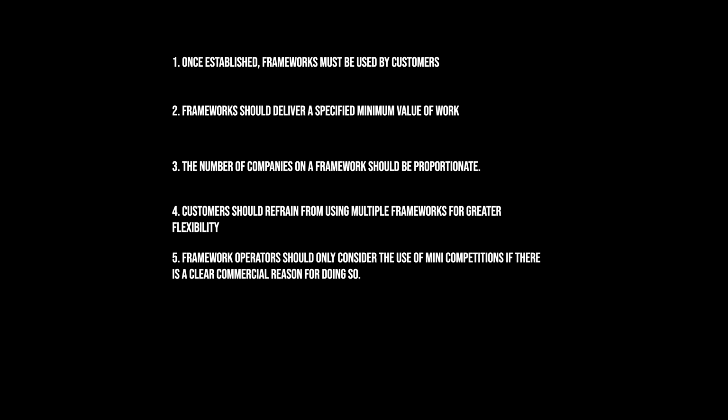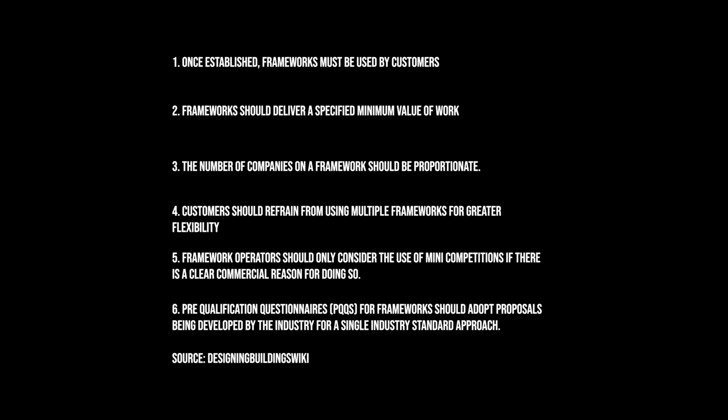Once established, frameworks must be used by customers. Frameworks should deliver a specified minimum value of work. The number of companies on a framework should be proportionate. Customers should refrain from using multiple frameworks for greater flexibility. Framework operators should only consider the use of mini competitions if there is a clear commercial reason for doing so. And pre-qualification questionnaires for frameworks should adopt proposals being developed by the industry for a single industry standard approach.